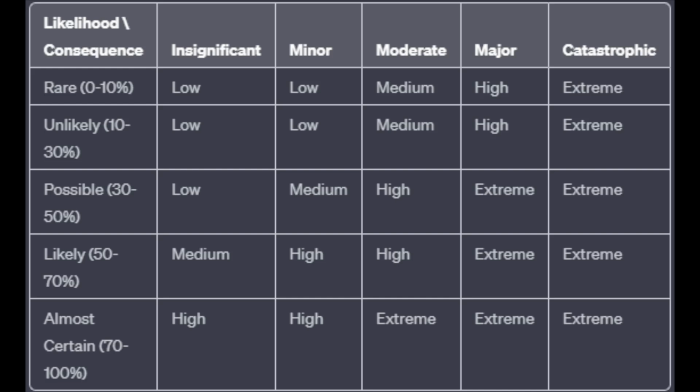This one is more laid out and trackable and measurable, which is great. Sometimes they are a little vague, and one PM might categorize a risk differently than another. So I think it's great that we're able to put some actual KPIs here with things like likelihood of the risk to become an issue, with that 0 to 10% range, etc. As you can see, the other ones, they're just low, medium, and high and extreme. So again, there is some variability and flexibility on the PM side to interpret what that means.